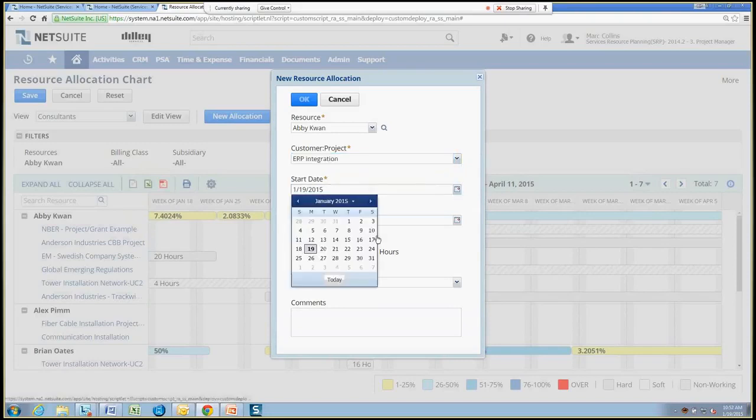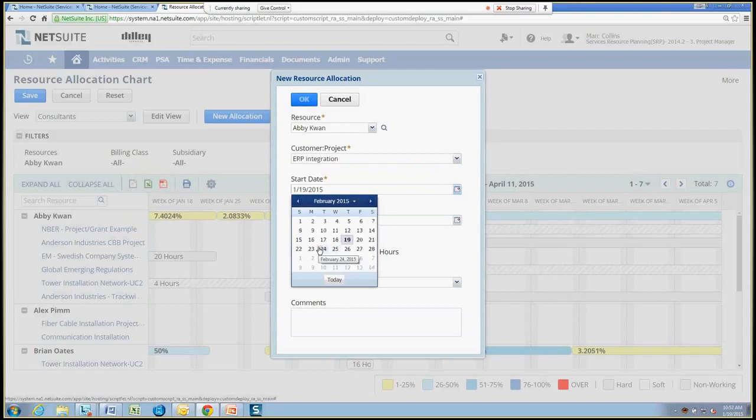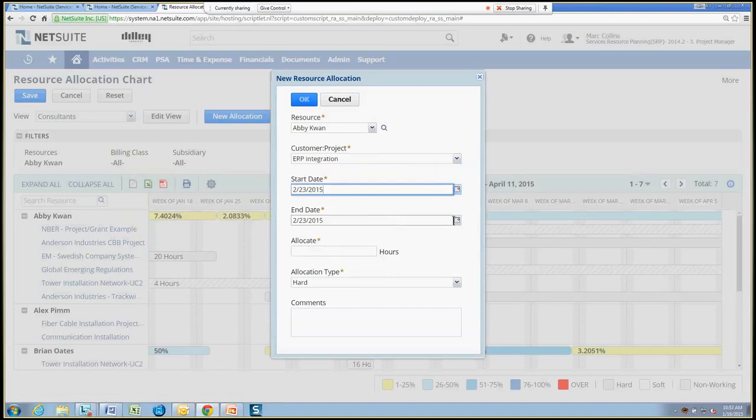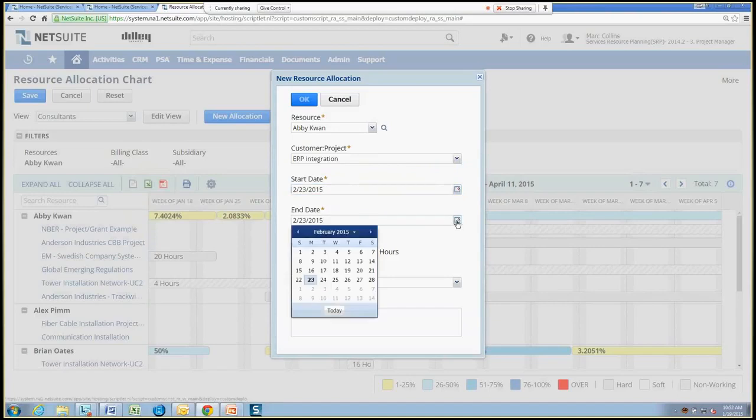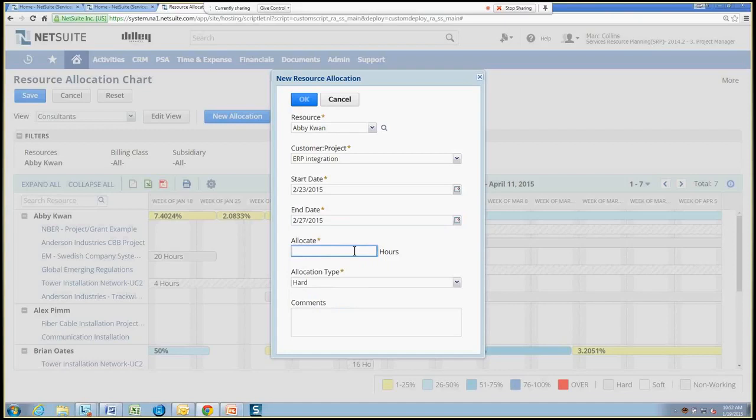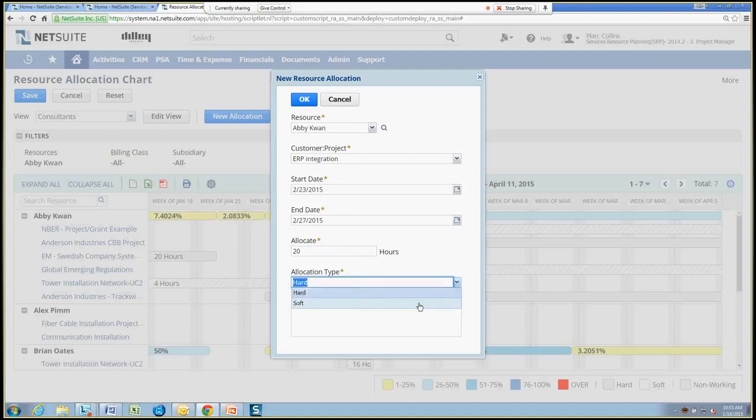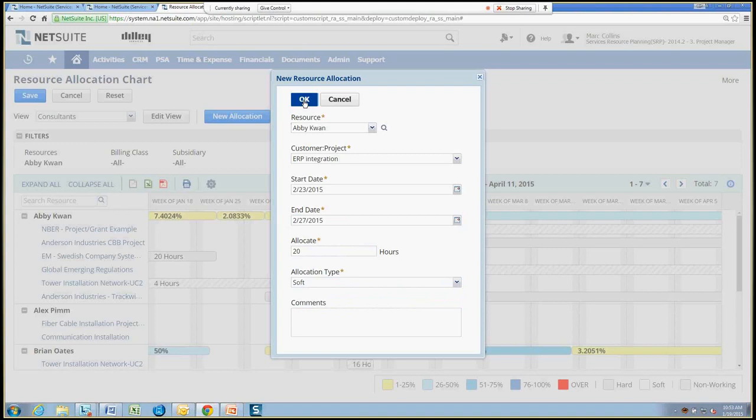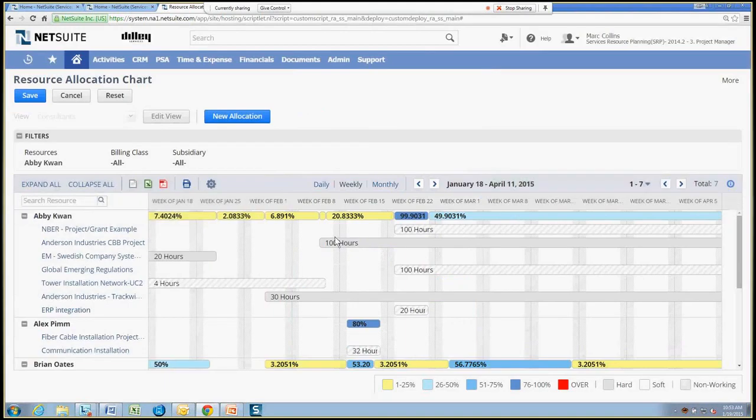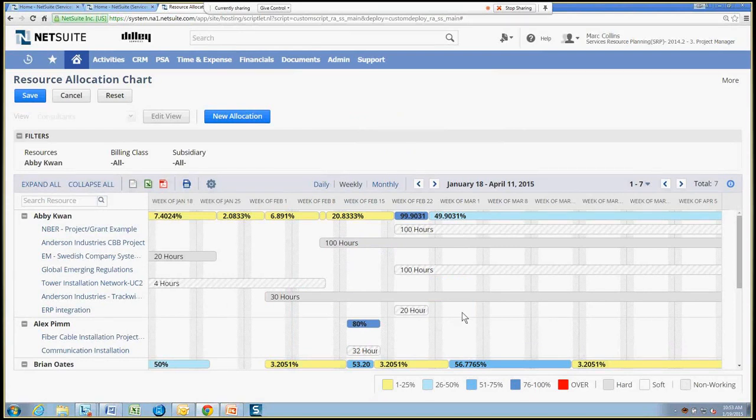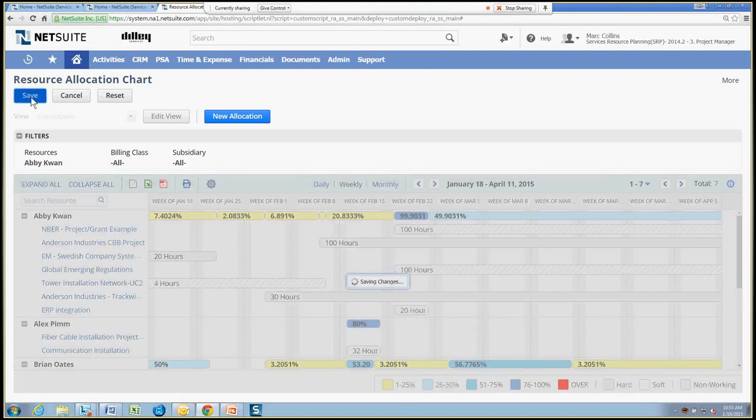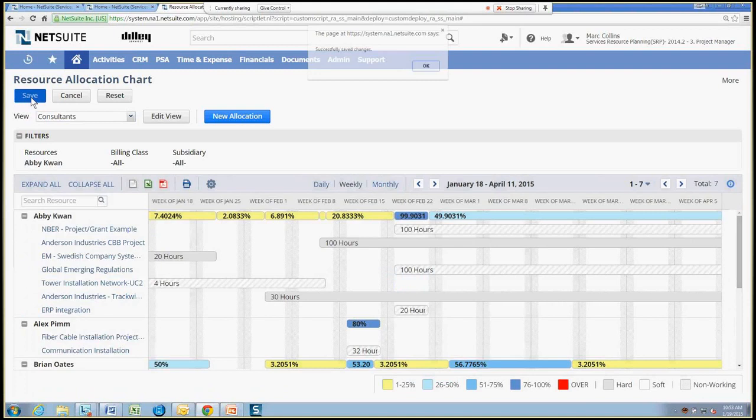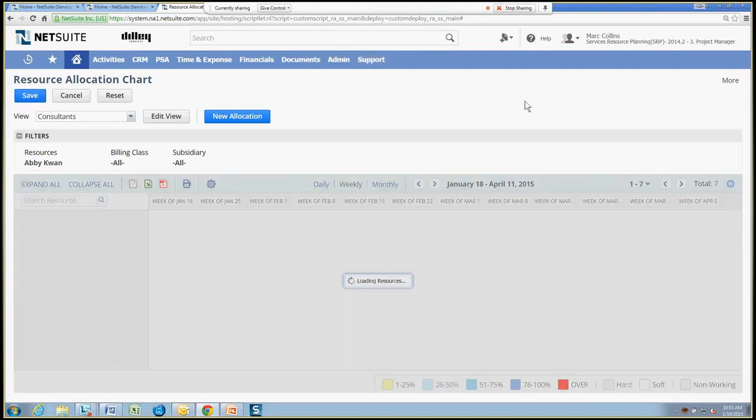And the project is going to be the ERP integration. And we will have her work that same time period that we were looking to schedule her for. So we'll go up to February and say the 23rd to the 27th. And we're going to allocate her only for, if it's one week, we're going to allocate her for 20 hours. And we'll make this a soft allocation in case we need to modify that. Now we'll see, we'll add her. Remember, we're going to add that 20 hours to ERP integration over to Abby's allocation, total allocations. And we'll save that.